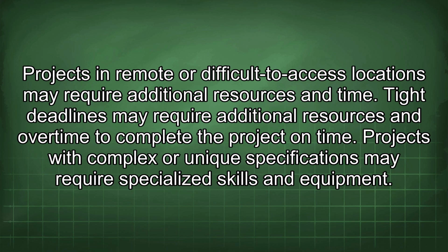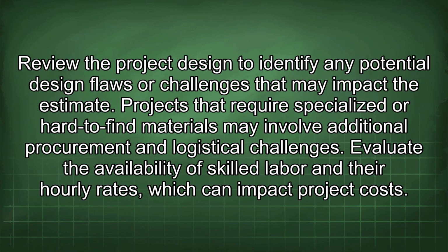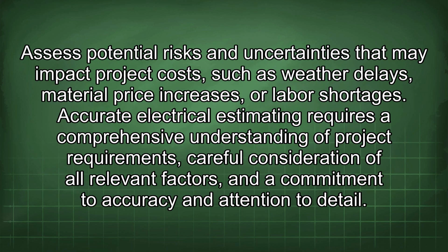Projects with complex or unique specifications may require specialized skills and equipment. Review the project design to identify any potential design flaws or challenges that may impact the estimate. Projects that require specialized or hard-to-find materials may involve additional procurement and logistical challenges. Evaluate the availability of skilled labor and their hourly rates, which can impact project costs. Assess potential risks and uncertainties that may impact project costs, such as weather delays, material price increases, or labor shortages.